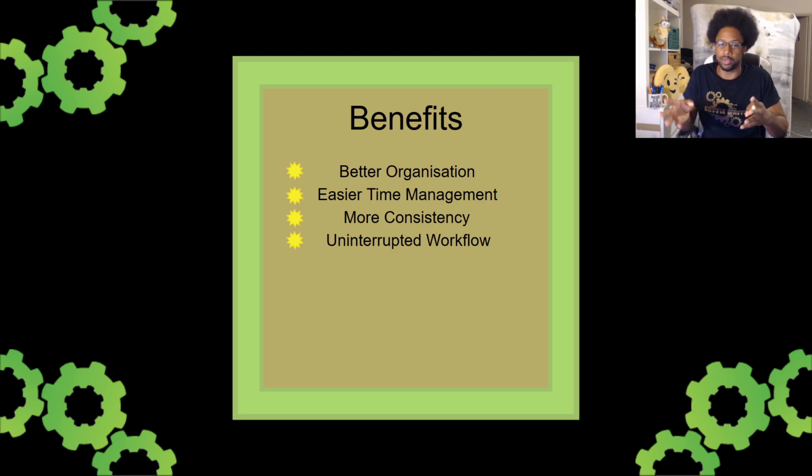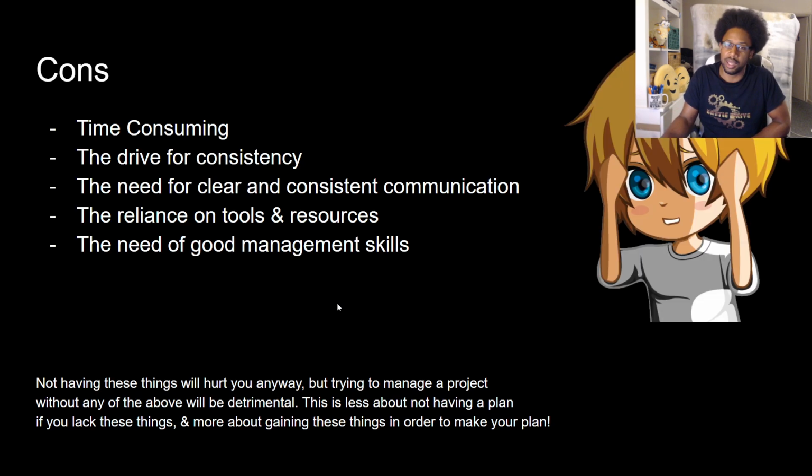Generally, with the agile approach, we might spend one full day doing a plan. At the very start of a project, we might spend like a week, but generally we spend one day doing a plan, then the second day for the project, and then another day for the sprint. And we talked about sprints in our previous stream. Whereas with the waterfall approach, you will literally spend weeks, if not months, planning, because they do all their planning in advance. In agile, we do planning in waves. Every 2 weeks, we update the plan, so it's an evolving process.